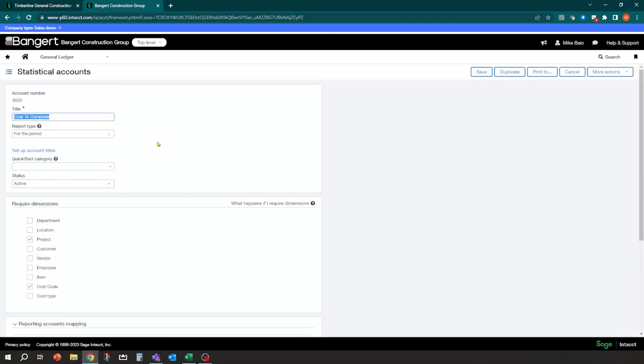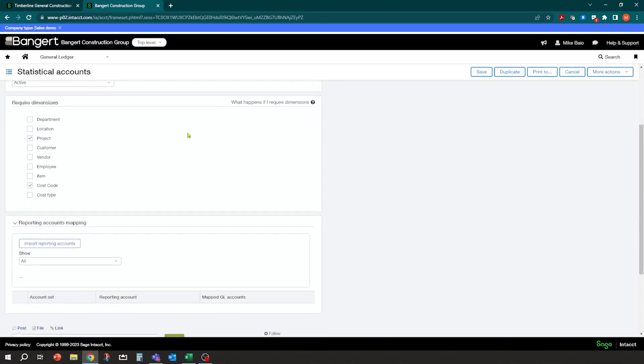And one of the things I didn't show you initially is I can come into here and into my statistical accounts and I can turn on or off some requirements. So for example, for this account, whenever someone enters an amount for this account, I want to make sure that they have a project and a cost code. So this will force the users to enter in the correct information that they need for the reporting. You could also elect to turn on cost type as well. So that's why this is coming in here. So if I don't put a cost code in, it's going to yell at me. It's not going to let me post that transaction.